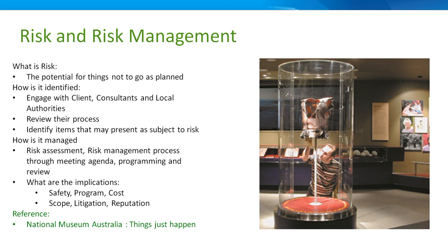That's just another example of how control can go. Is it my problem? It's a construction manager's problem, and it's the window manufacturer's problem. And then there's 3 trades that are waiting on the windows, and then there's the client who wants to open, and the client came to us and gave us another job. So in a way, it's our problem, and we'll do our best to solve it. So we always include risk and risk management as an agenda item in all our minutes at any stage of a job.